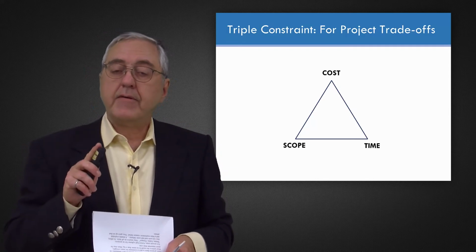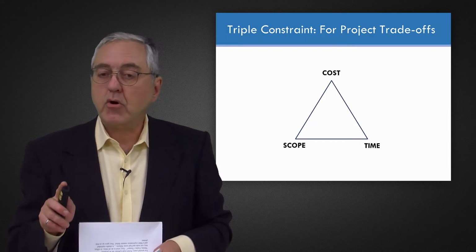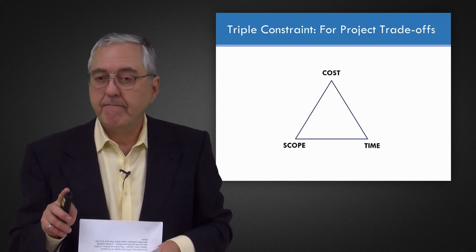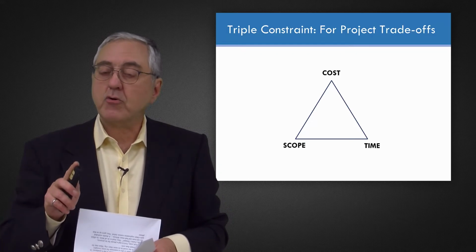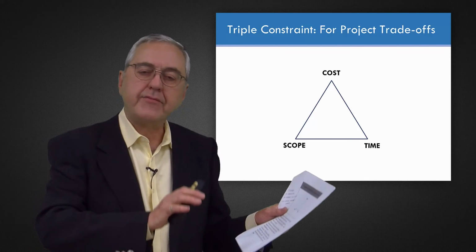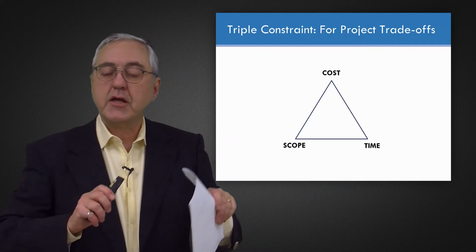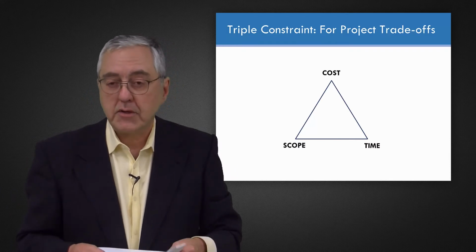If scope is more important than time, and if cost is more important than time, then maybe we can agree to let the schedule slip, as long as I'm maintaining the budget and delivering you what you're requiring.